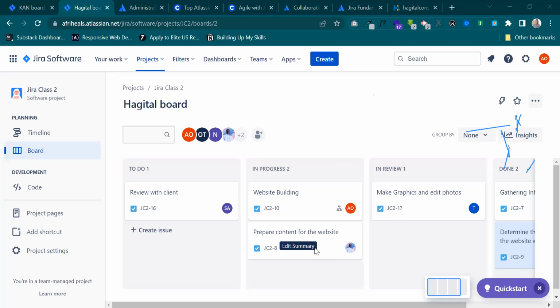Once you're through with it, of course, I gave you a task, you got it done, then you have to let me know instead of just putting it there. So you have to let me know, move it into review. So then I will receive a notification. Then I would also come here and check. So once I check, you are going to attach a file. Once you attach a file, I go into that file, look at everything that has been done.